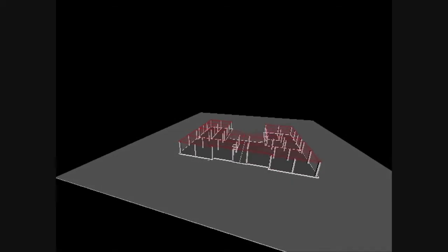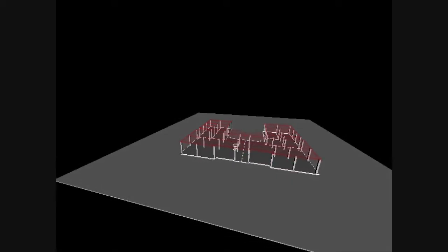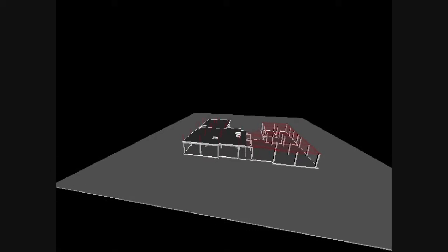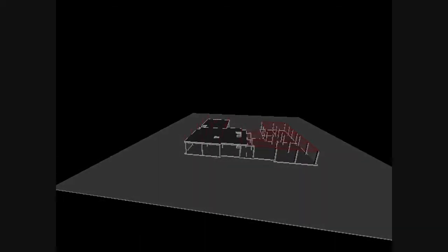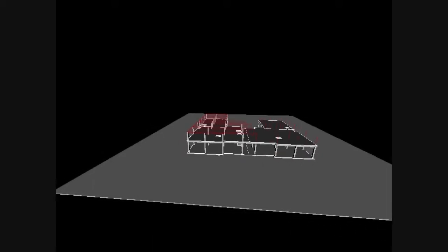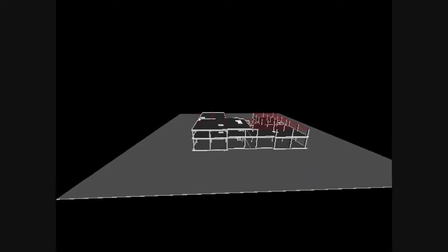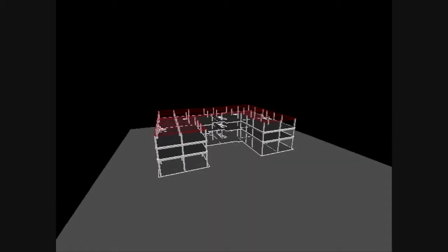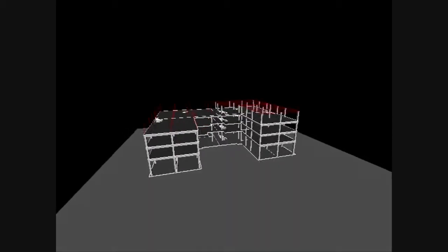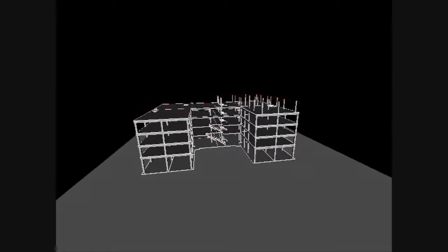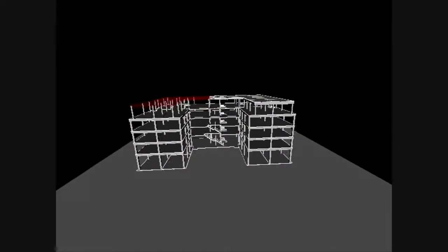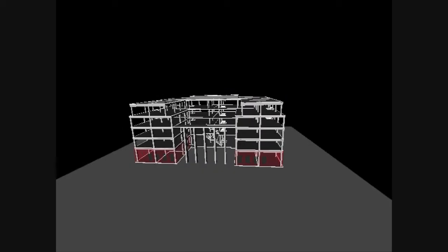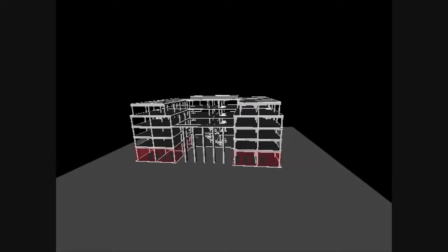Once the north columns have reached the proper strength, shoring will be installed and a pan system installed before the second floor elevated slab is formed and poured. This sequence will continue in the same order for the remainder of the structural concrete construction. After the structural concrete is finished, the building shell will begin to go up.